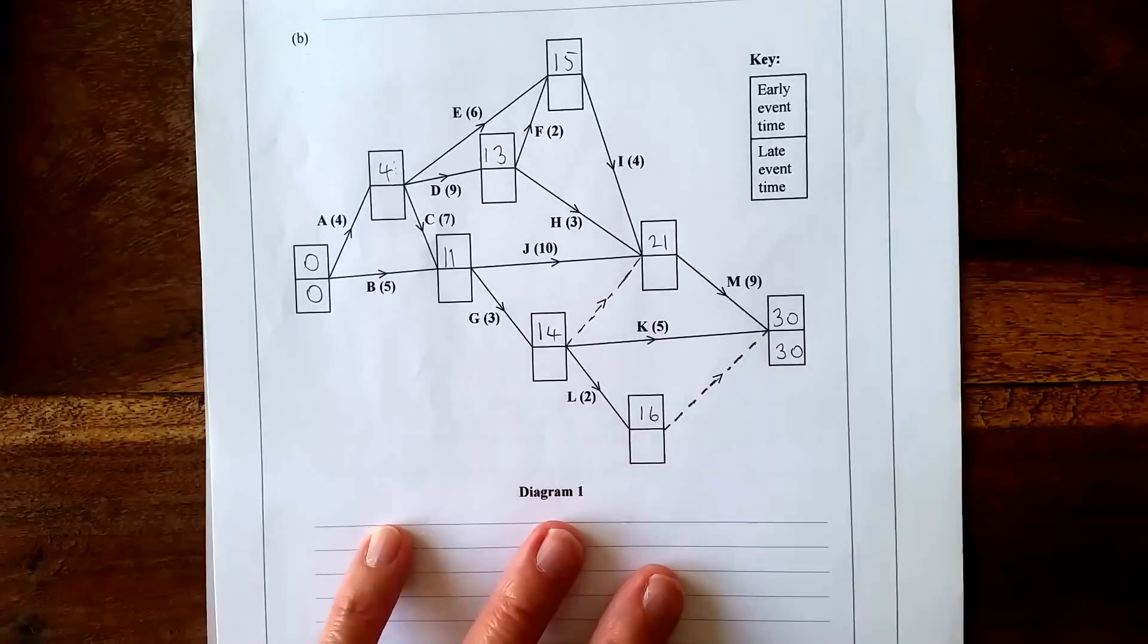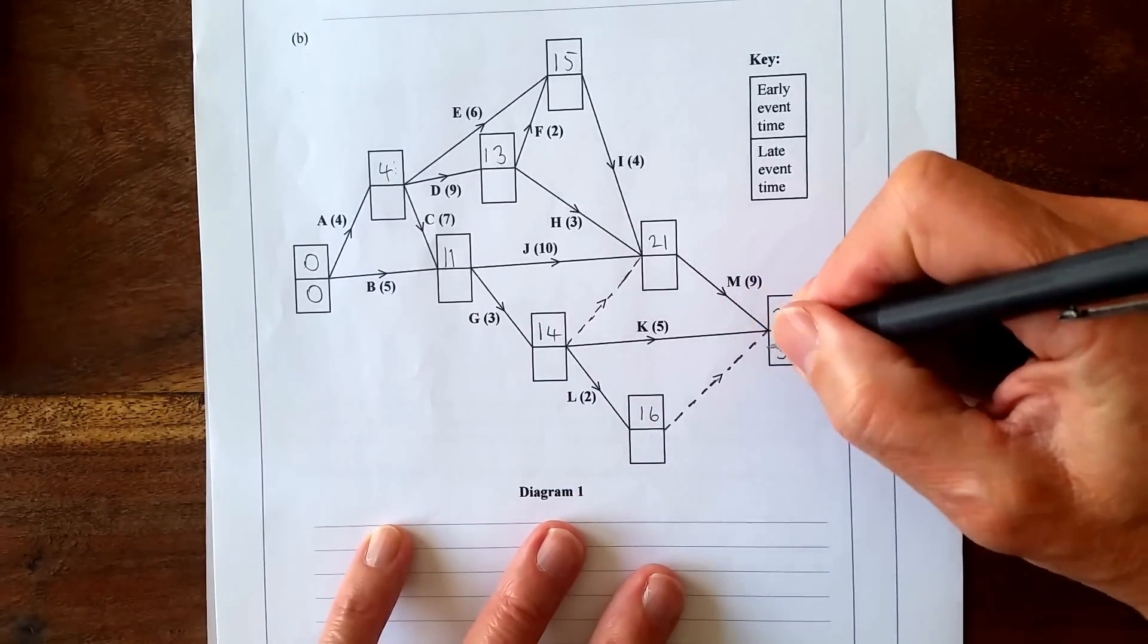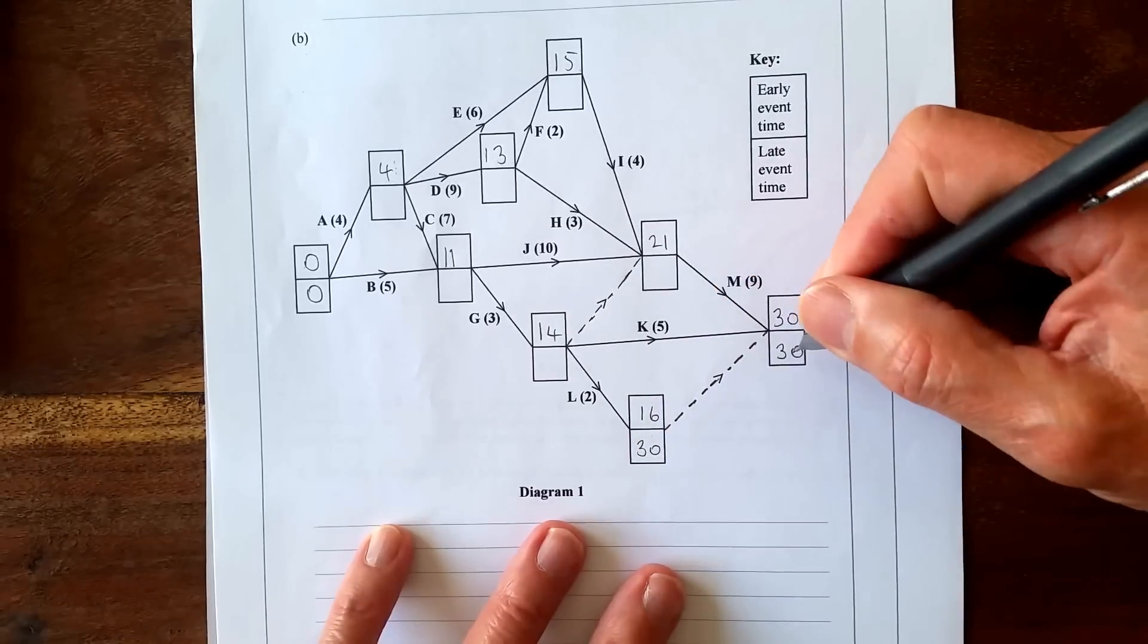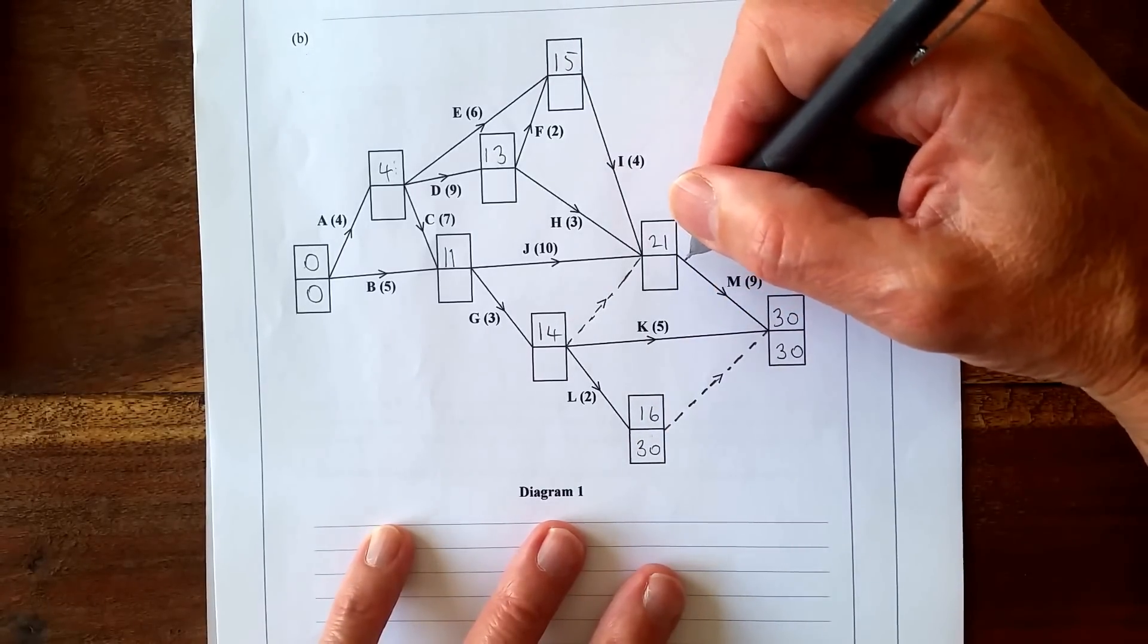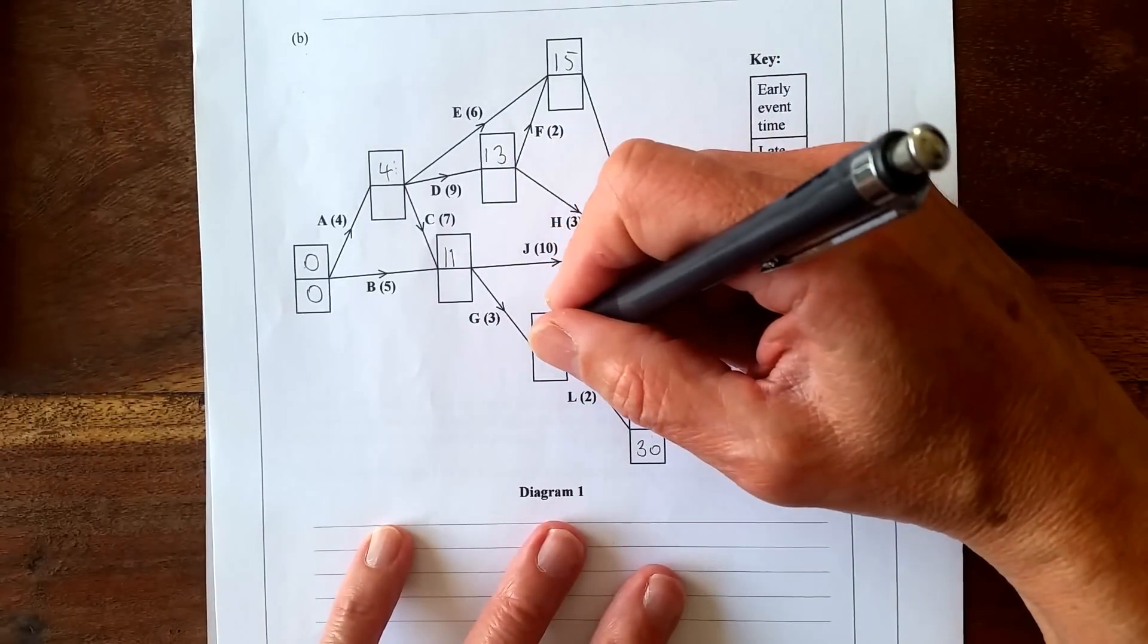Now when you get to the end, you put 30 here and you work backwards, and you want the smallest going back. So let's subtract this one because it's a dummy, there's no time, still 30. And then 30 take away 9 is 21, and 30 take away 5 is 25.